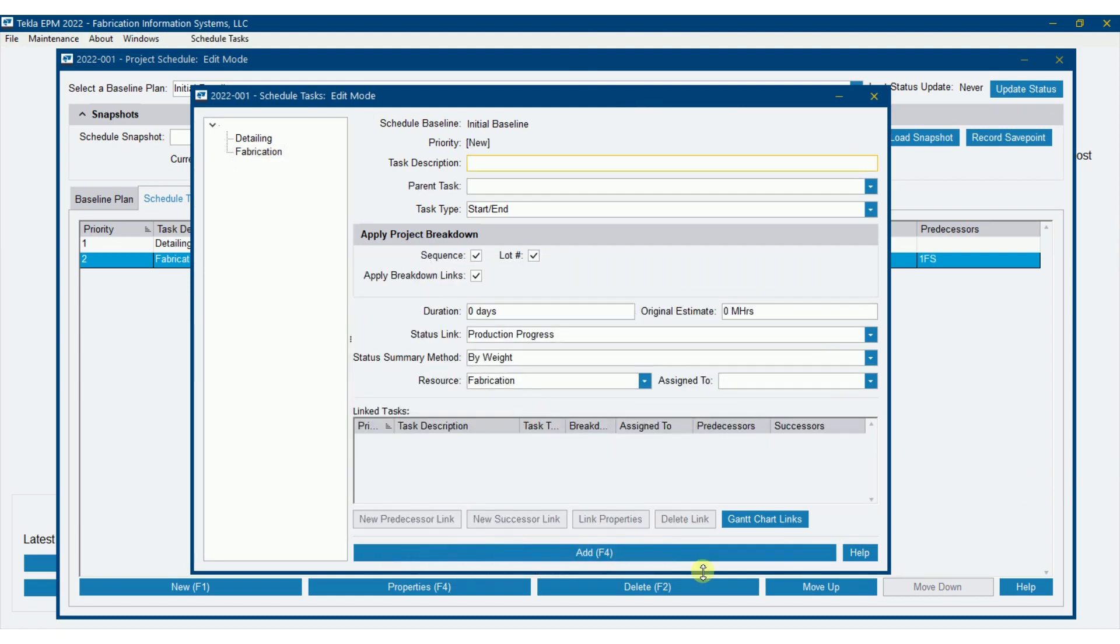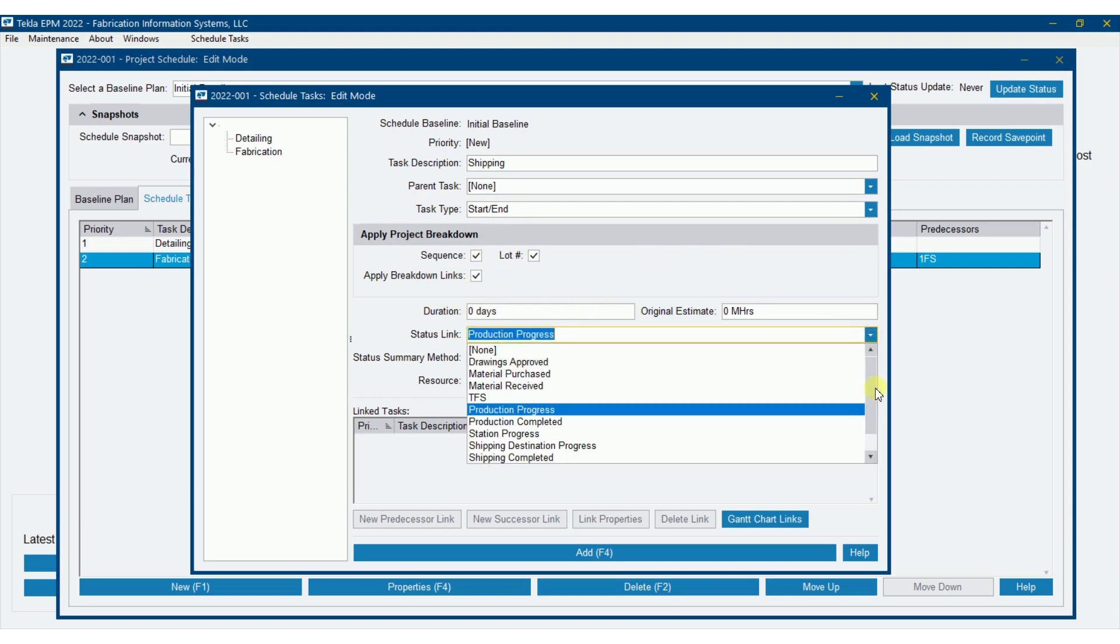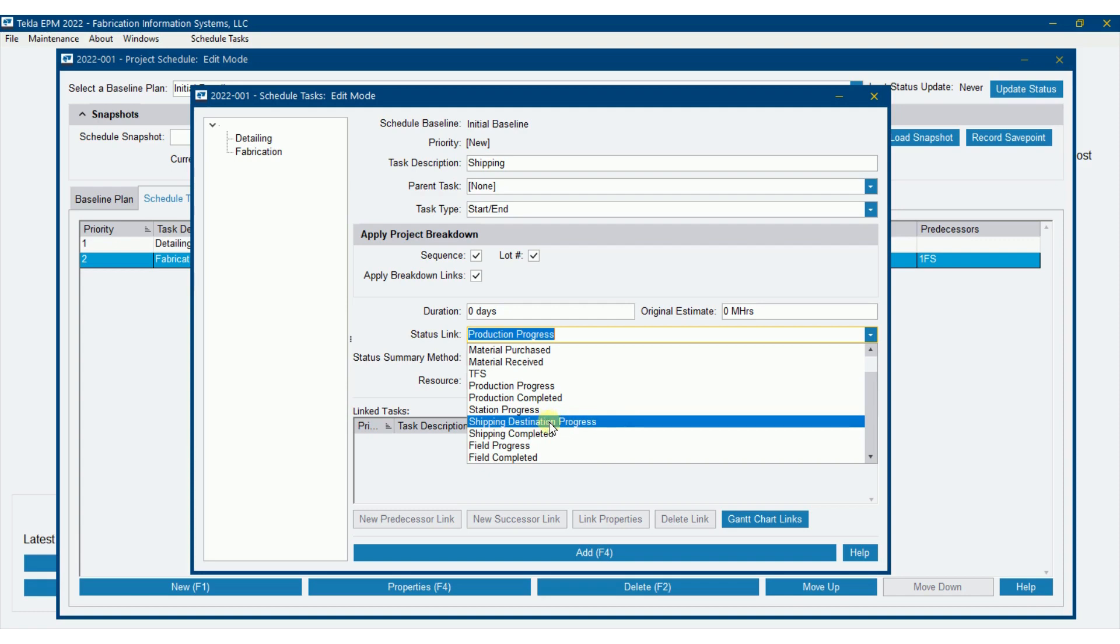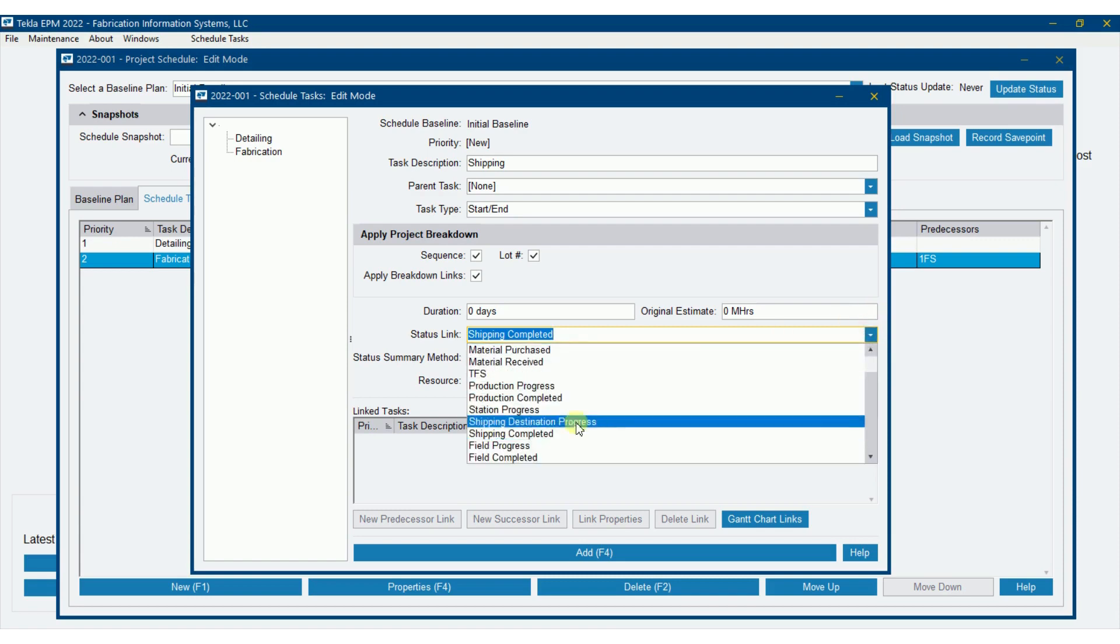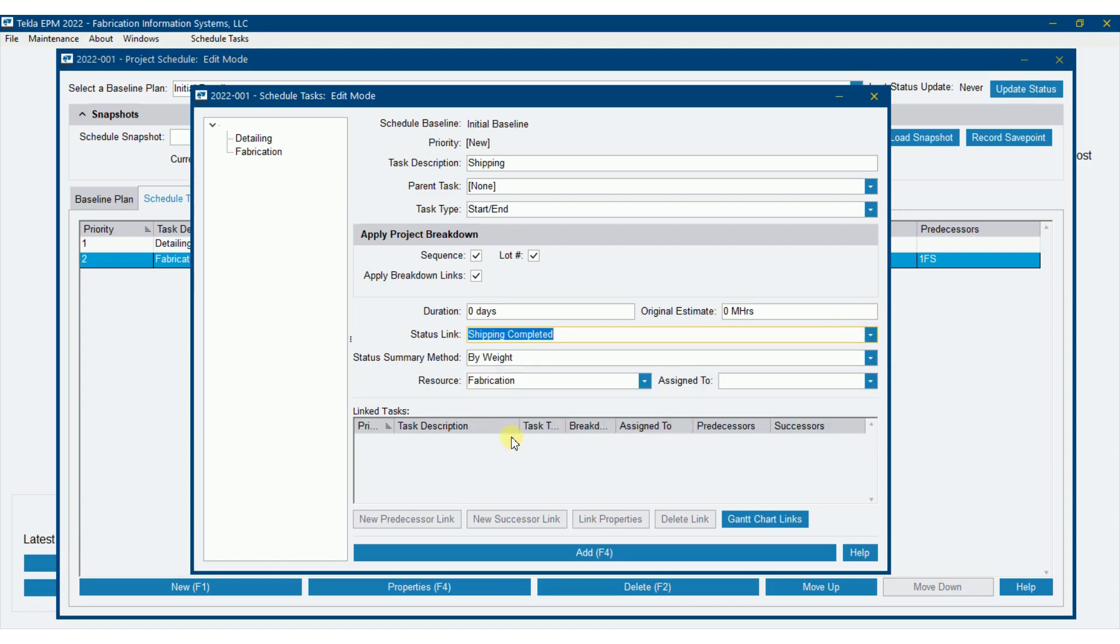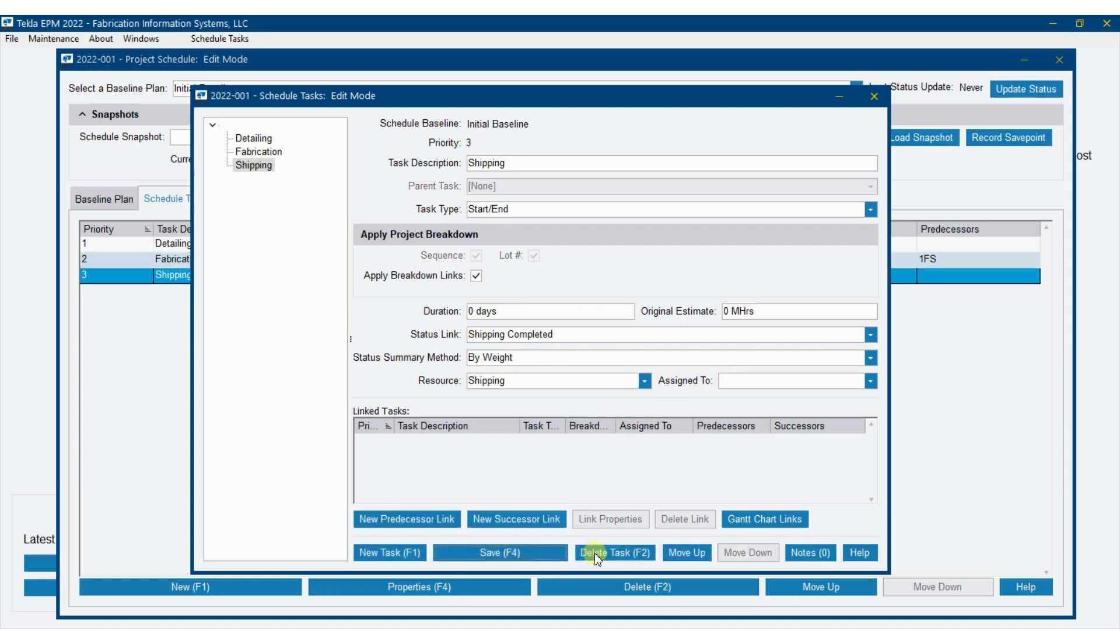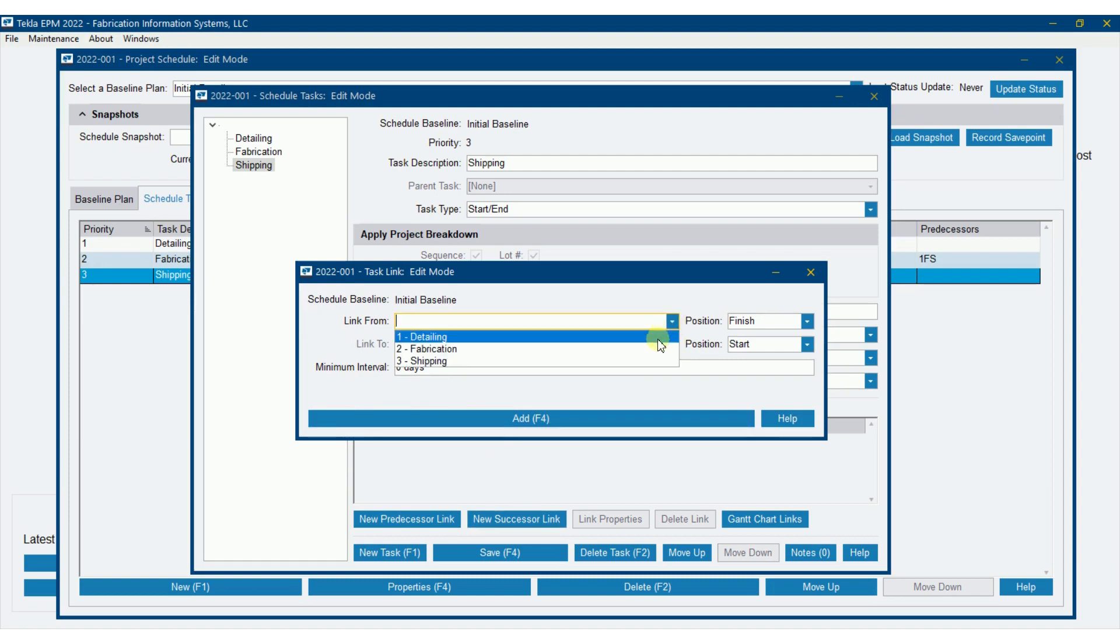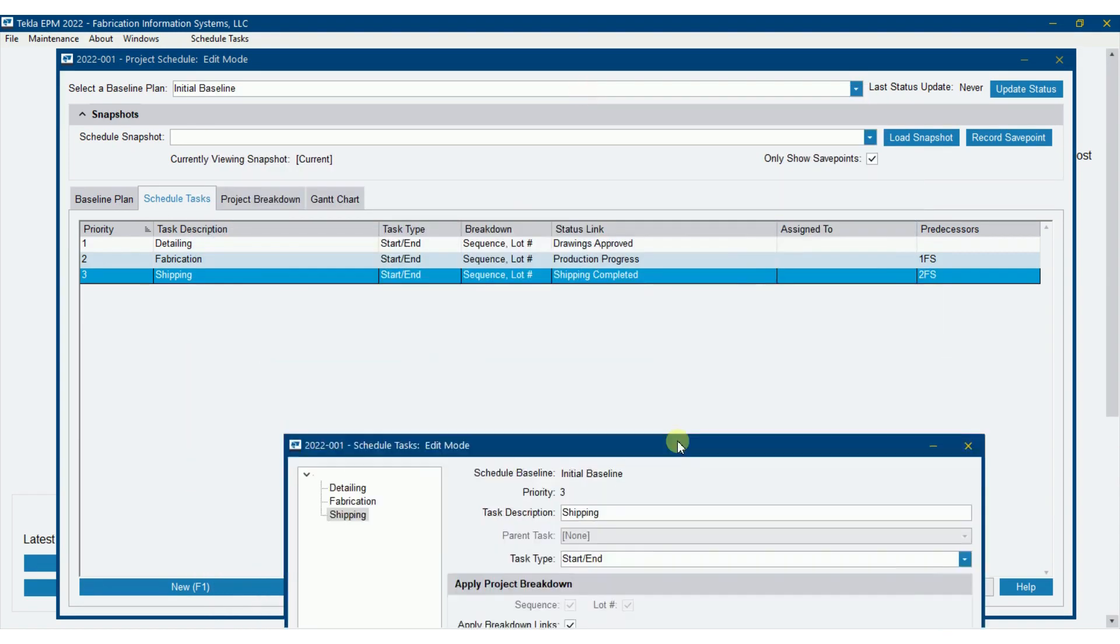Then we're going to add in shipping. Go through this a little bit quicker now. Apparent task, still none. Start end. I'm going to break that down as well. I'm going to change my status link to shipping completed. Notice I could do shipping by destination progress as well, so I want to track it to the galvanizer instead. I'll say shipping completed. Notice too there though, there are field progress ones as well. We'll get to that on erection. But status summary method, I'm going to do that by weight as well. I'm going to assign this a resource of shipping. I'm going to add. I'm going to do a new predecessor link of fabrication here as well. Finish start. There we go.